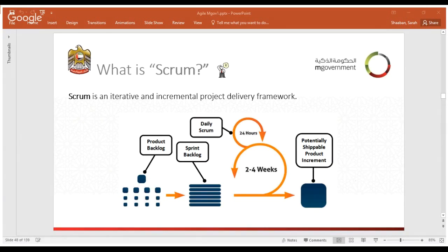In Scrum, it is different because we have an incremental approach. We take from the product backlog, like if we have 100, only 3 or 4. Those 3 or 4 requirements are selected for the sprint backlog based on priority, because each requirement in the product backlog always comes with a priority from the business team: what makes sense for them to be delivered first. And the requirement has to fit into the timeline for the sprint, which is usually 2 to 4 weeks.